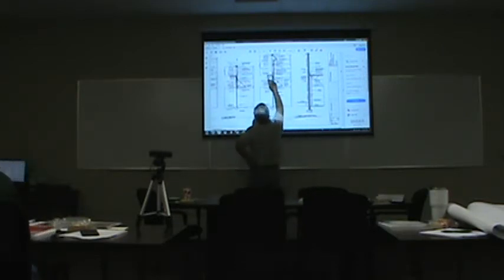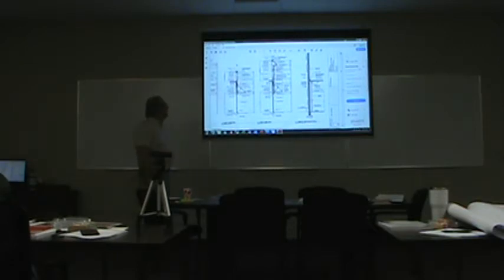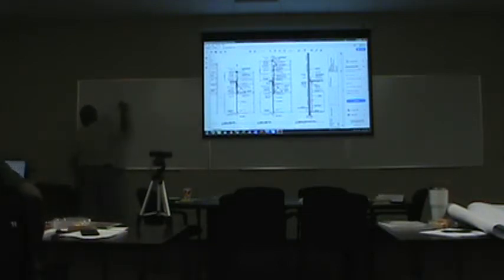When we look at this, we see the roof, it goes up, it goes to a parapet, right? So do I have to build anything into those walls? I've probably already built my electrical junction boxes in, but I got to sheathe the front of that wall, don't I? Okay. So my first activity is going to be what? Sheathing. Okay. Then what is my next activity? Once that sheathing is up, what can I do? Do masonry, right? I can do EIFS.